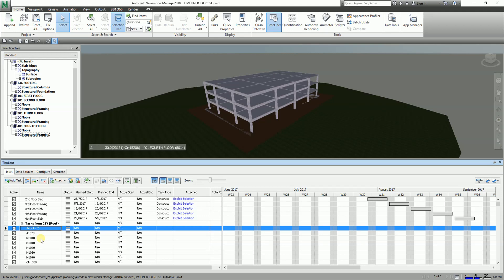Because most of us in BIM construction in starting a project, especially on the management side, the project management side, they already created this task ahead - so they created that in Primavera, in your Microsoft Project or other scheduling software. So if they already did that, you can now import that here in your Timeliner which is very time-saving feature of Navisworks.